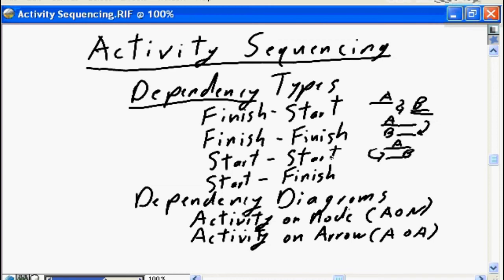Similar application, except in this instance the tasks are dependent on the start of a phase, the start of a milestone, and the subsequent tasks can start once the phase or the milestone has been initiated. A final type of dependency is start-finish, not commonly used, and therefore will not be discussed further in this nugget. The most common style of dependency is finish-start and will be used most times in creating a project plan.